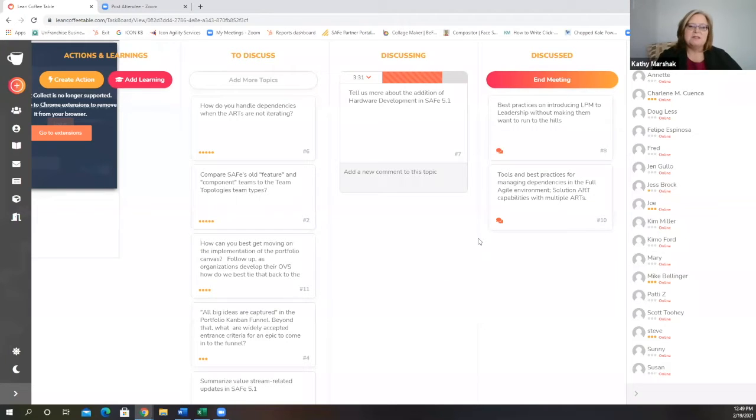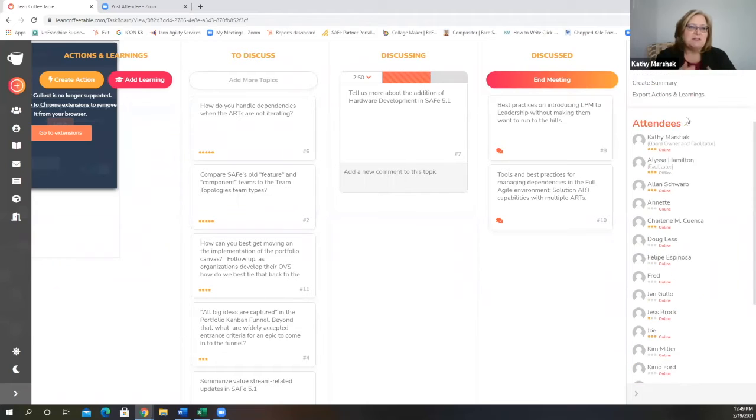Yes, and I think there's been more discussion about some of the realities in the hardware world. We know that in certain industries, there are very long lead times for getting certain parts and types of assemblies, or if you need to create a new kind of chip. Recognizing that some hardware elements do take a lot longer, using milestones, those ideas are still applicable.